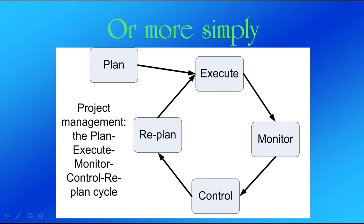In this diagram, the plan is you creating the game to the point where you have a playable prototype. Execute is playing that prototype — first solo, and then later with other people. While the game is being played, you monitor whether it's doing what it's supposed to do, whether it's going according to plan. Control is when you see that something isn't going to plan — what are you going to do about it? How are you going to fix it and make it work the way you want?